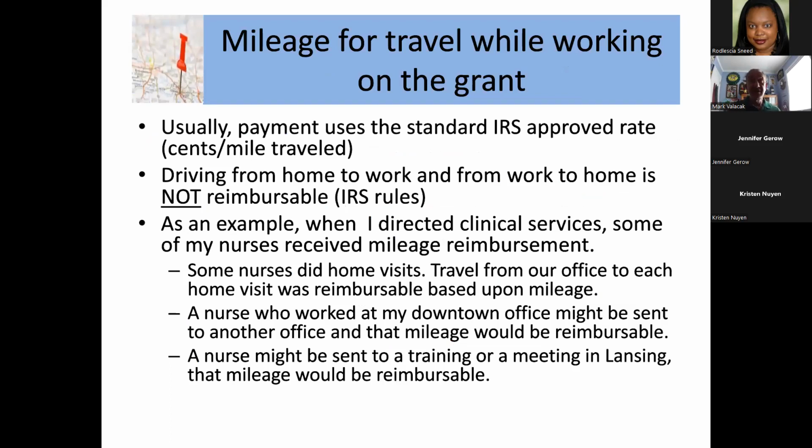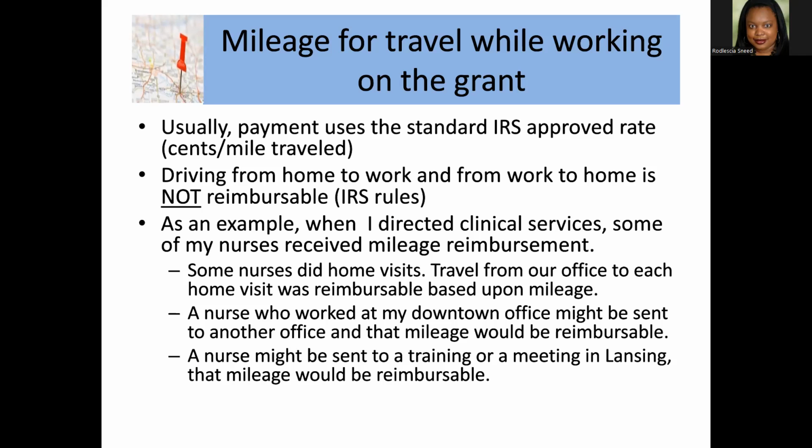Mileage is another thing that if you've got workers who are working as part of the project and need to travel. So the examples that I have, some of our nurses did home visits. So travel from our office to each of the home visits was reimbursable based upon the mileage that they drove. So most agencies will use the standard IRS reimbursable rates, and the IRS calculates these each year.